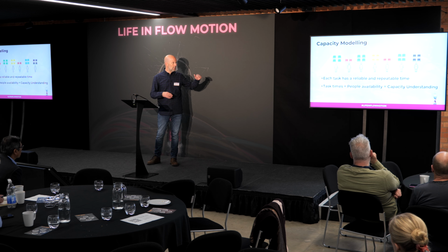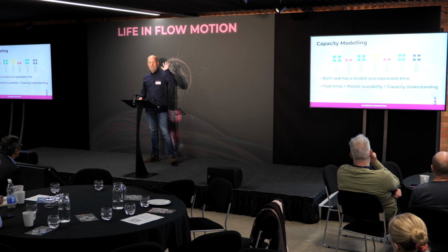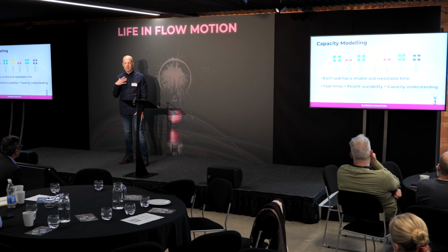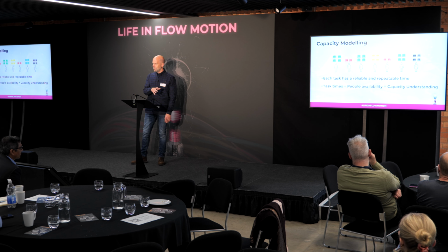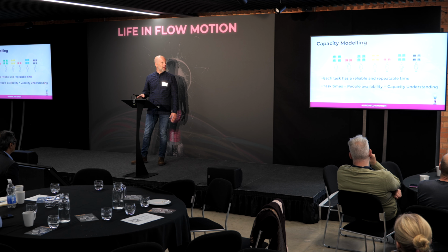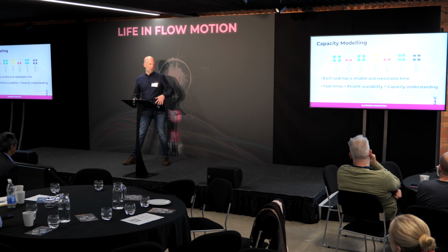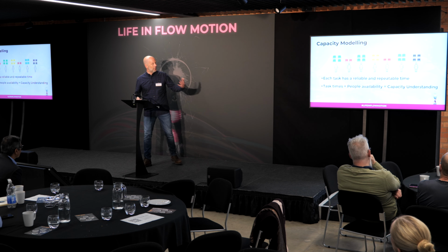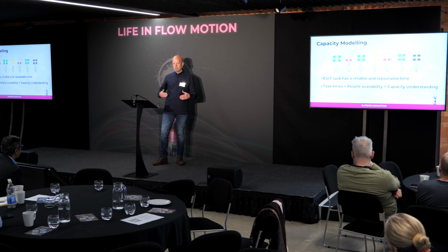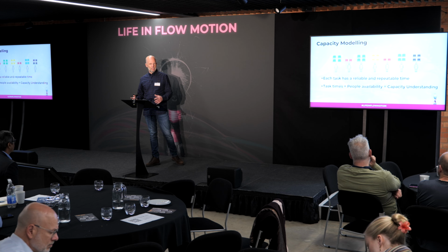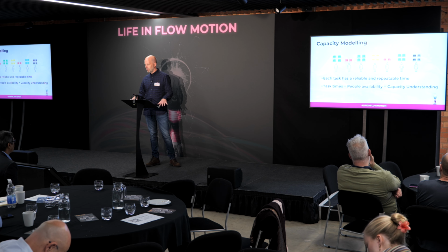So if each task is sized in the same way, and you take 4 hours, you take 4 hours, you take 4 hours, and I take 5, the first question you're asking is why? And that's going back to the change process. If you don't prepare well, you'll end up having a tsunami of why. Because all these questions you've never asked yourself in the past about how long things take, who's doing what, how many problems, and the amount of problem solving you have to do about why things are variable, all comes to the surface at the same time and everything grinds to a halt.